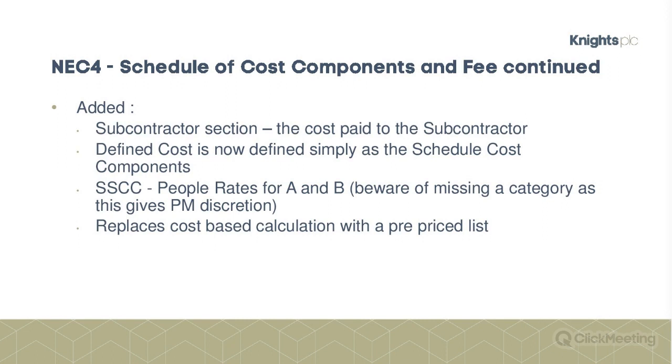And it also means you've got a rate for site foremen, no matter how many you have on site, or labourers, rather than having to go through individuals who might all be on different packages and different rates. Just beware there of missing a category. You might want some catch-all to say any others will be paid on market rates, or will be paid on cost. But that would be fairly horrendous if one category of person wasn't included.